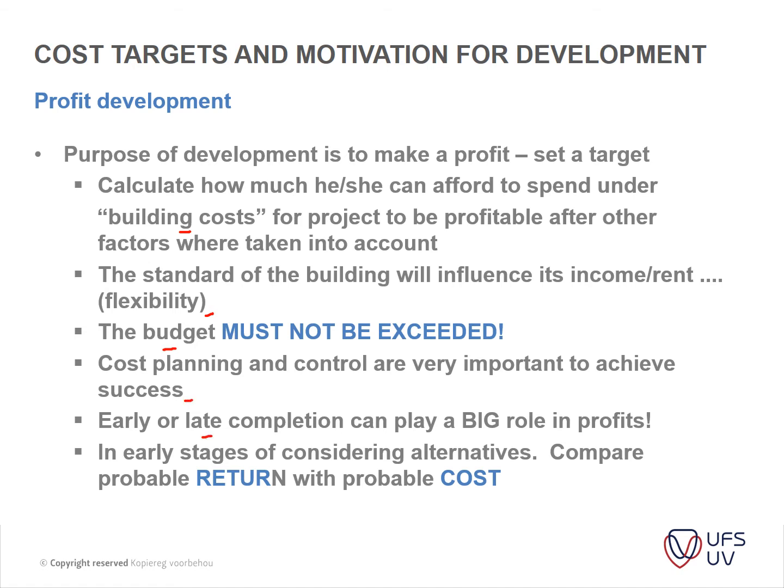And then early or late completion can play a big role in the profit. A shopping mall is a very good example of this. If you complete late, the tenants of that shopping mall will move in later, and thus the clientele will only start going to the shopping mall and spending money later on. Whereas if you complete the project quicker, the earlier the developer will get an income from that.